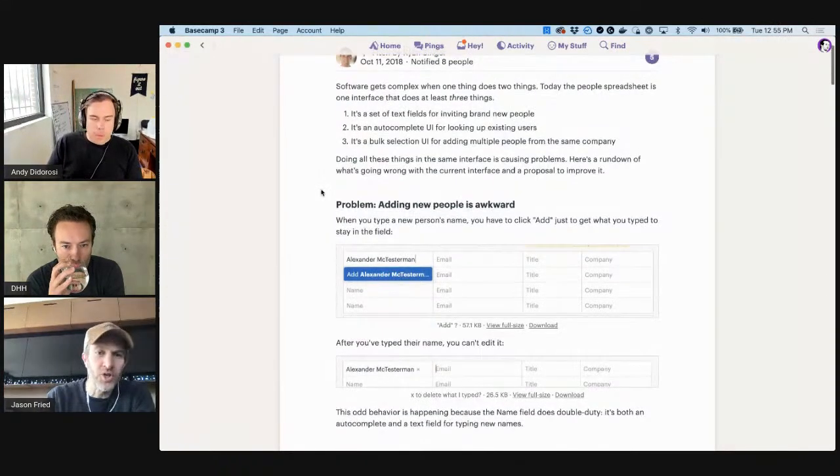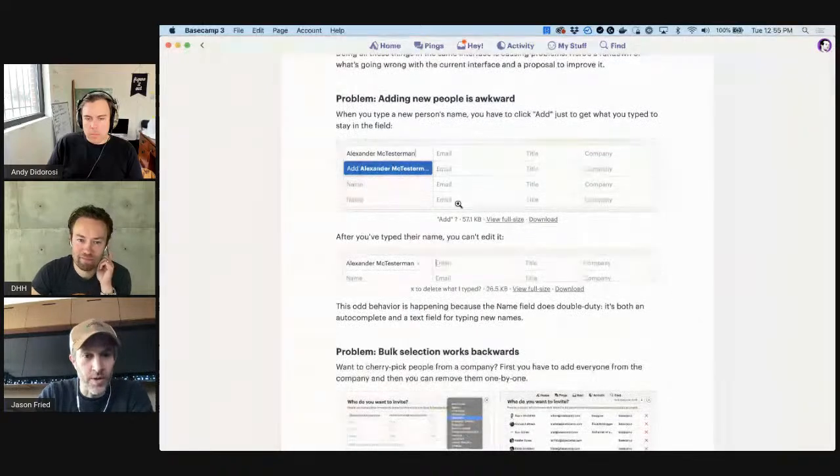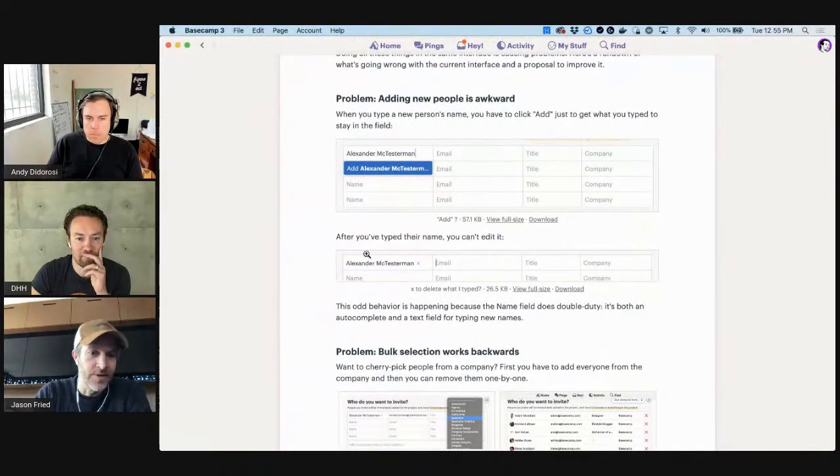a really good pitch starts with the problem. Why am I even pitching an improvement in the first place? What's wrong first? Okay. Here's what's wrong. This is awkward. What's awkward about it? Well, you can't edit the name after you've added it. It truncates the name because the field is narrow. Why is the field narrow? Well, the field's narrow because we're sticking 4 fields next to each other in a small amount of space.